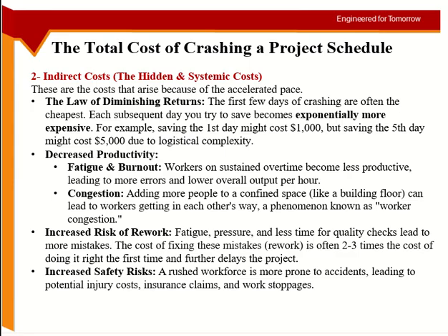The law of diminishing returns says that as you keep on trying to reduce the schedule more and more, the per unit cost of reduction is increasing. Okay, or the per unit benefit from the cost is reducing. Okay, so for example, you may be paying $1000 extra for saving 1 day, but on the next day you may be paying $2000 extra for saving another day. Okay, and so on and so forth, like I showed you in the graph.